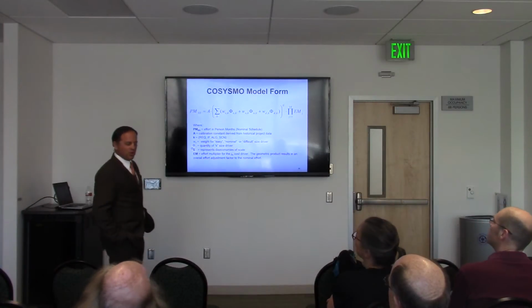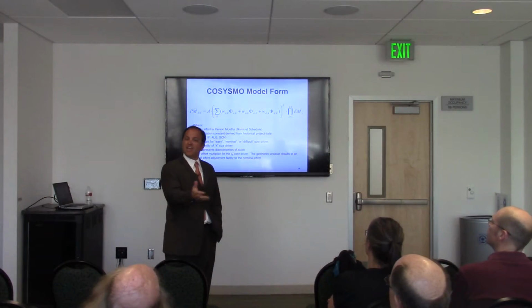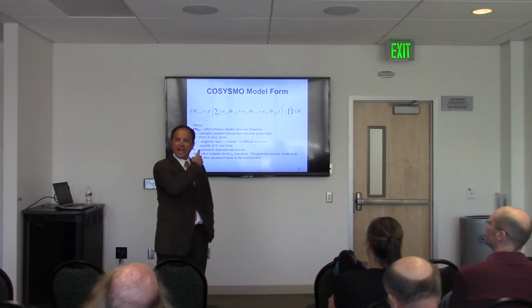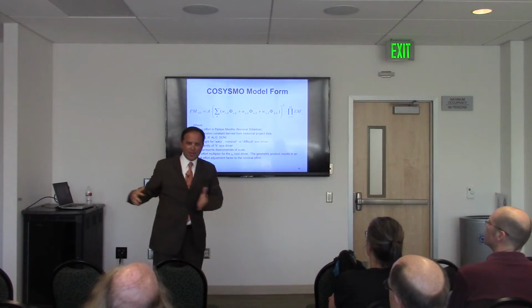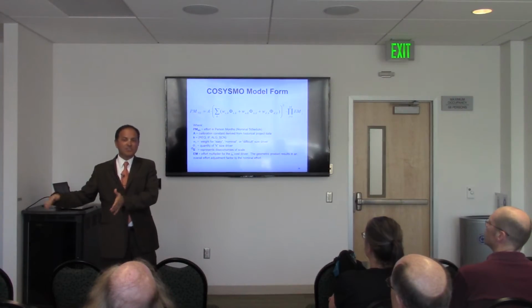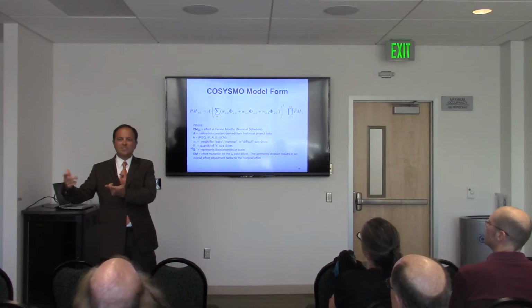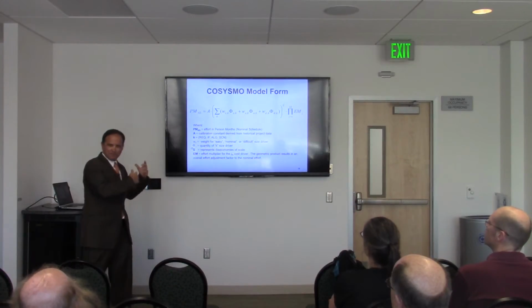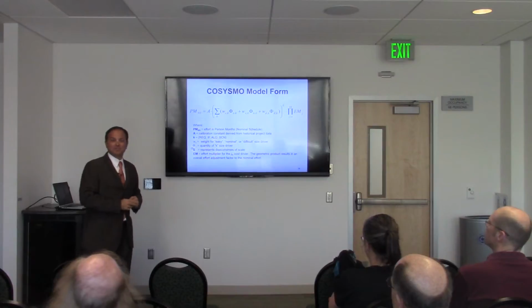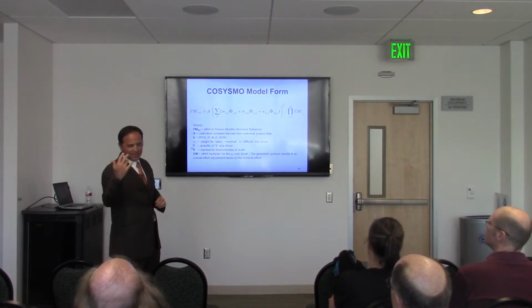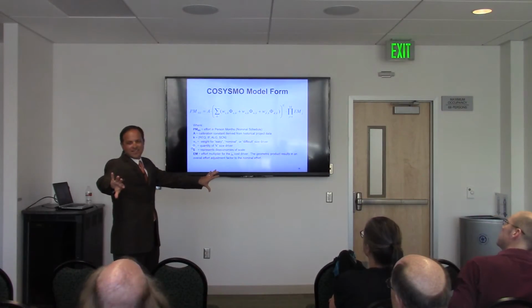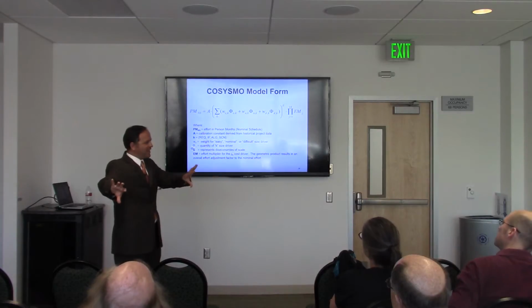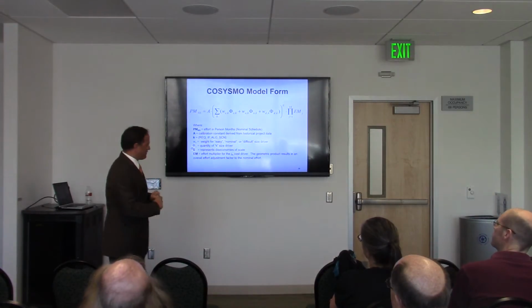Yes, right. So what we do is we feed data into the model to calibrate the equation, and then data that we did not use for the calibration we use to test the model to see whether, yeah. And I have a pretty graph to show you how that looks visually later, but essentially we data split. Train the model with half the data, validate the model with the other half.